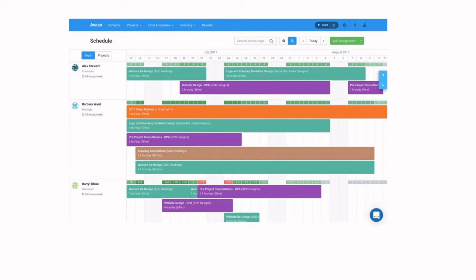In our PERT charts we aren't doing a full-on mapping of resources, but it's important to think ahead. When doing mapping of projects you will need to start doing resource mapping — recognizing that one person can only work on one task at a time and only has so many hours in the day. The same applies to machines: a machine cannot run two projects simultaneously and there are only so many hours in the day to run it.